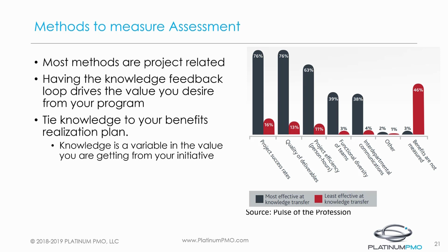For example, 76% of organizations that are effective at knowledge transfer measure project success rates to determine the value of their knowledge programs, whereas other organizations question whether this correlation is direct enough to assess. A great recommendation to measure the success of your knowledge transfer is to tie it to your overall benefits realization plan, because knowledge is a variable in the value you are getting from your digital transformation initiative.